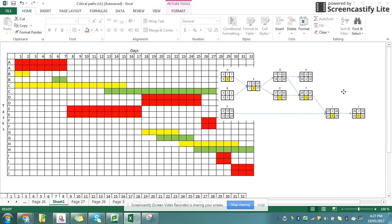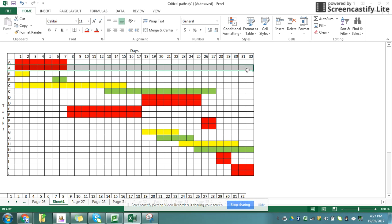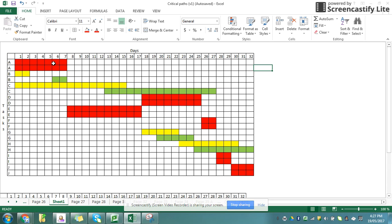Right, at this point, I no longer need my diagram, so I'm going to ignore it. Now, importantly, the lines that are duplicates aren't actually necessary. I could delete those. The other thing I'm going to do to get my finished Gantt chart is I'm going to draw all my critical paths in one line.